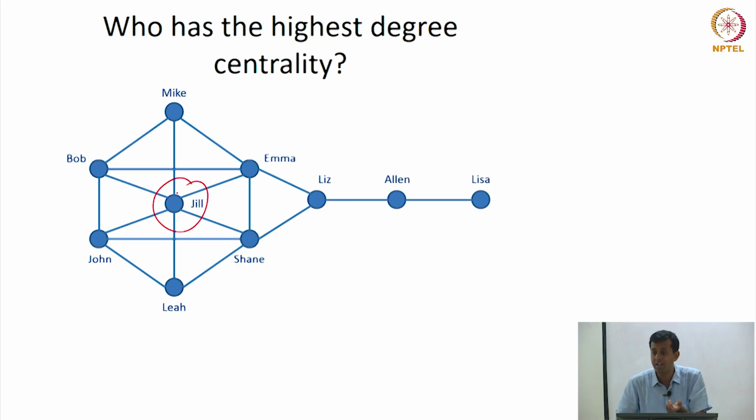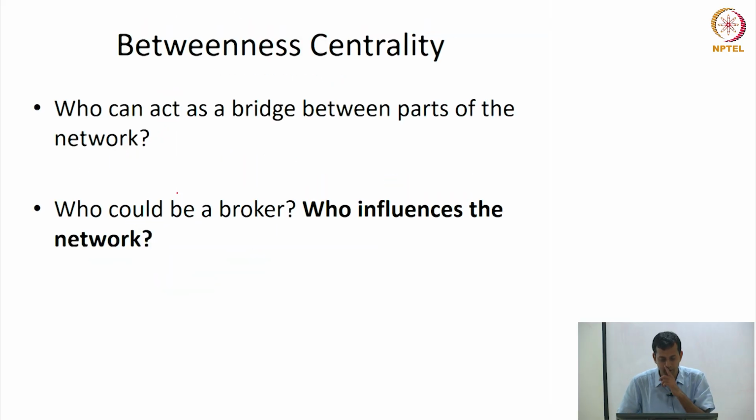But I want to understand the centrality of the network. I want to understand who are central, because this is a stakeholder who, if I can positively influence, can possibly positively influence a large portion of the network. This for me could be NRCS, or whoever, or maybe even the International Rivers Network. If I can influence these guys positively, it really spreads. Whereas some other Save Bujagali crusade might be somebody peripheral. If I influence them, it might take a lot of time, it might not even be possible for them to influence the network, okay? So that's what we call degree centrality.